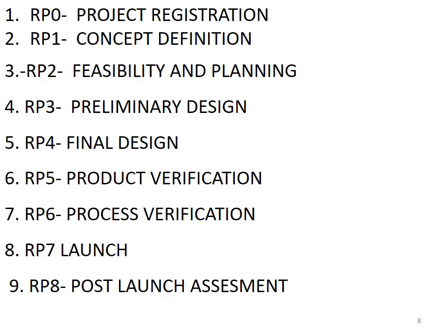So after testing so many preliminary designs, we have to finalize the design suited to a particular product. So now we go for making detailed and optimized designs, freeze hardware and software designs, complete engineering documentations. So here we need to design each and every component needed to develop this product, draft technical documentations, secure beta prototypes. So here, after making the final designs, we go for making a beta